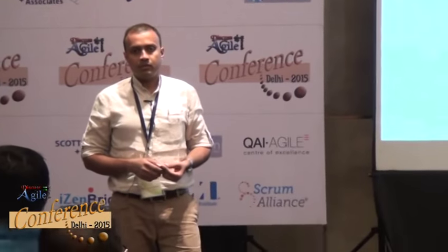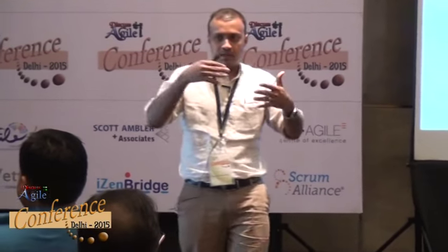Yeah. And then when you start doing the acceptance criteria or the requirement, you realize that I can break it into multiple stories, and then comes the estimation. You should not think about the estimation as the very first thing. That's actually the next level, when you do backlog grooming, where you talk about the size. I'm not touching upon that now, but we can probably have a discussion offline about it, right? Okay.